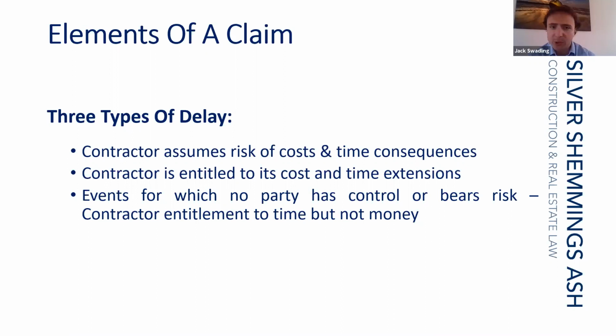And I suppose a recent important example, well, recent issues that people have been looking into, are force majeure clauses under the extension of time provisions in contracts, and provisions that provide for how a contractor is entitled to extra time in the event of government interference, the government intervening to prevent work. These are typically events that are neutral, give the contractor more time but no money.